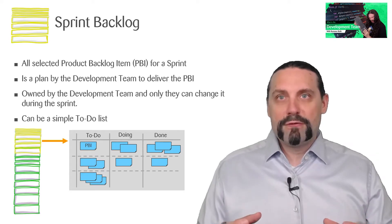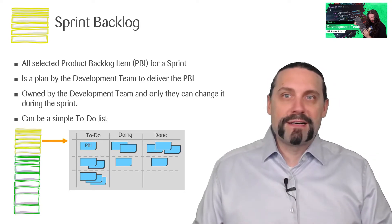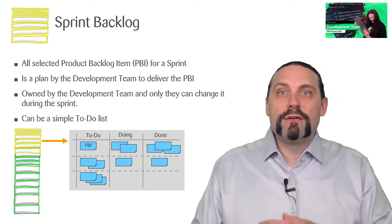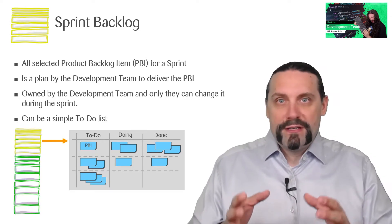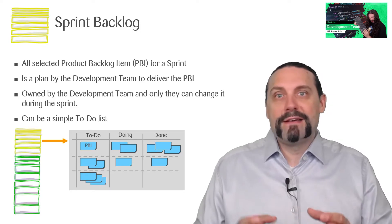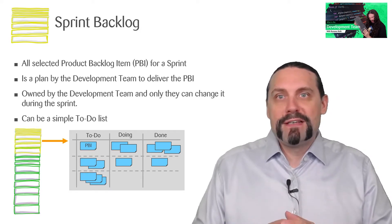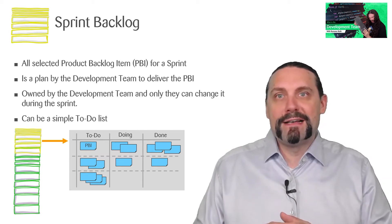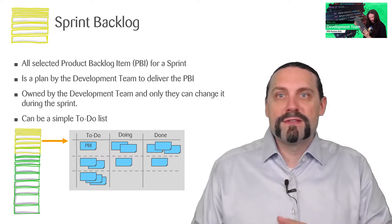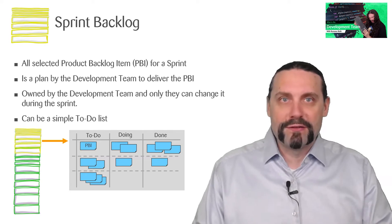When we look at the sprint backlog, it is just a simple to-do list. You can make it as complicated as you like, but in general in its simplest form it has three columns: to-do, doing, and done.